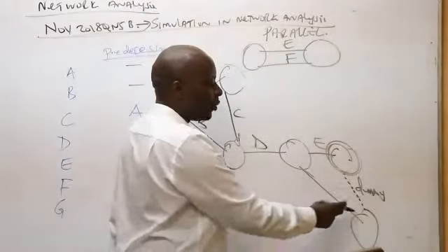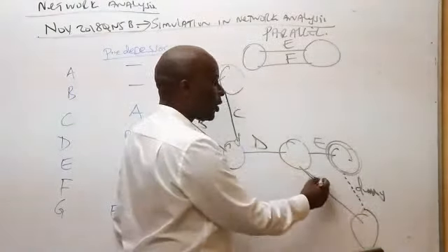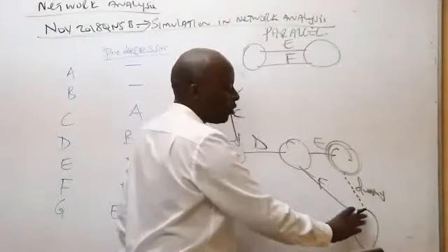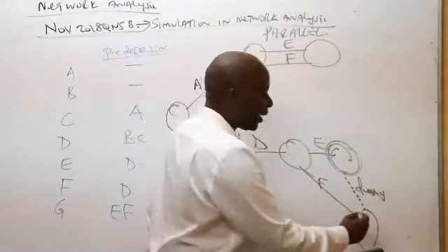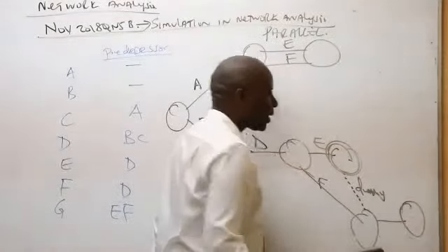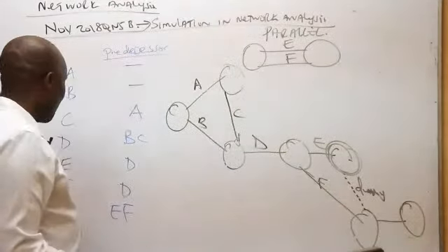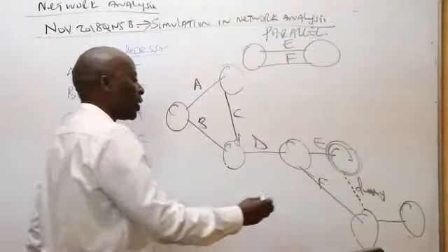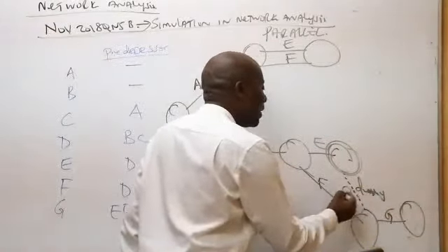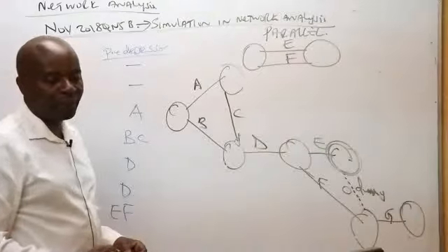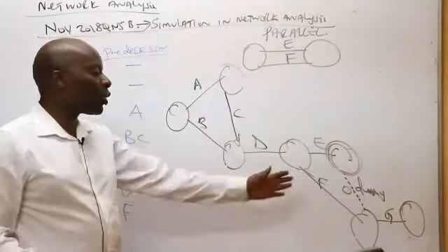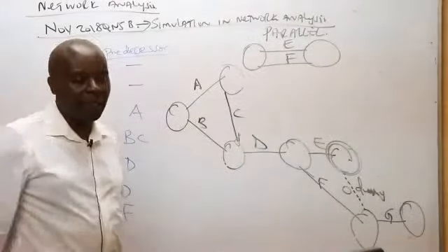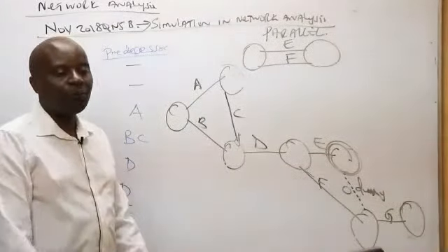So now, ladies and gentlemen, we have this node, which now signifies what here, somebody? The ending of both E and F. And once both have ended there, now I can come and pull my last activity known as G. Remember that a dummy is a non-existent activity, which does not consume any resources. So besides dummy, I must always put what there, somebody? 0, like that. 0.